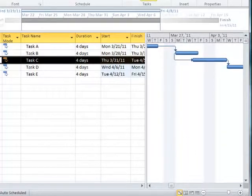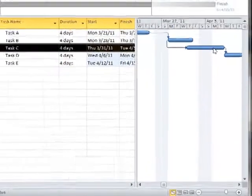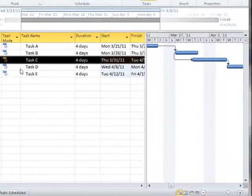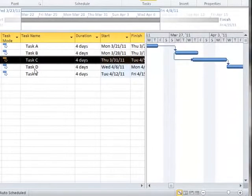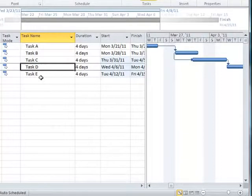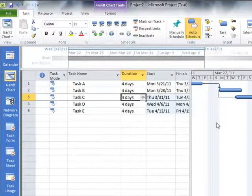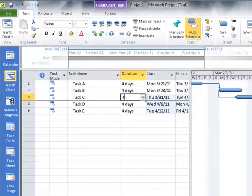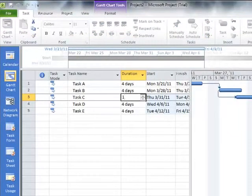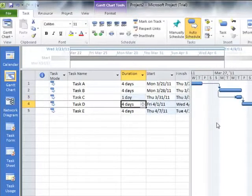Let's look at another example of how we might use lag. That's a type of relationship where we need something to occur during working time. Let's say Task C is actually ordering some equipment, and Task D is doing something with that equipment. It really doesn't take four days to order the equipment. There's really just one day of ordering, but there's three days of lag until we actually get it. It takes three working days until UPS or FedEx or whoever's delivering it actually gets these parts to us.